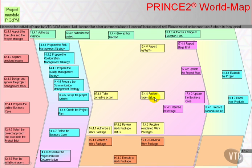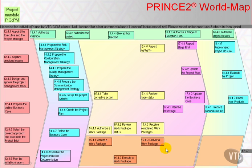When review stage status recognises that there isn't a subsequent stage to follow, we prepare planned closure, hand over the products — which in truth is checking the products delivered have met all their quality criteria, so there may be no formal handover at this stage because they may all have happened earlier — we evaluate the project's performance, and recommend project closure.